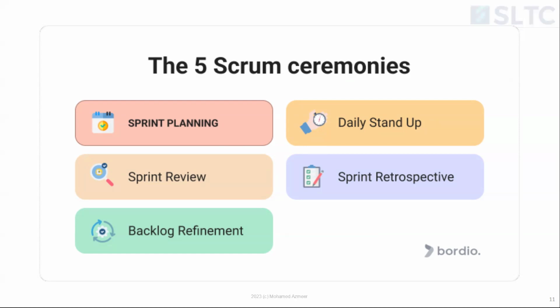Everyone needs to get together, whoever is working in the project, to plan the sprint, because if you are a developer, they'll ask you, how much time do you want for this feature? You can't say I want 3 months. You must back it up with some data and say, okay, I did a similar one in a certain other project, so it took me this much time, so I'm assuming this might take, say, 1 week or 3 days or whatever. So sprint planning is where you discuss things and also you give the points to your stories.